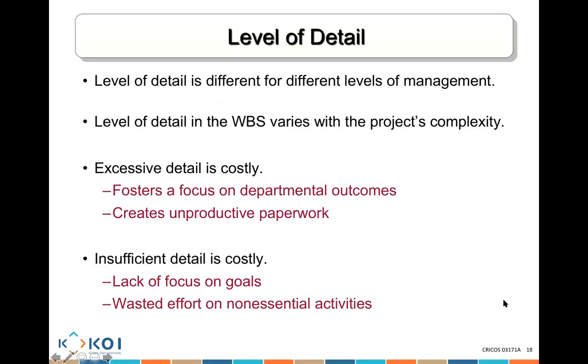Now, the level of detail is very important, guys. You don't want too much detail, and you don't want no detail. You want appropriate detail. Why? So much detail will become very focused on every department doing its job. It's going to become unproductive paperwork. And if you spend so much time planning, the opportunity may be lost, whether you want to implement that opportunity.